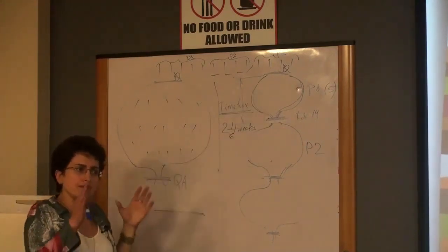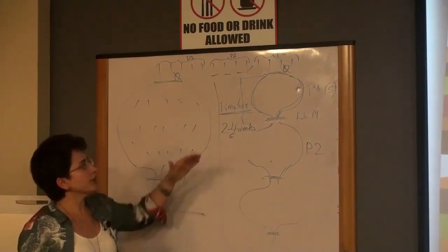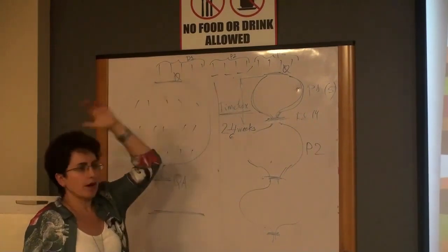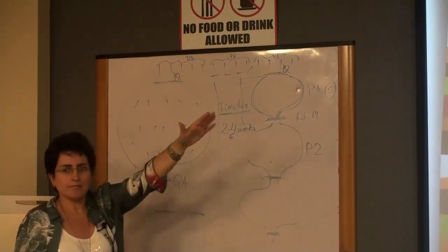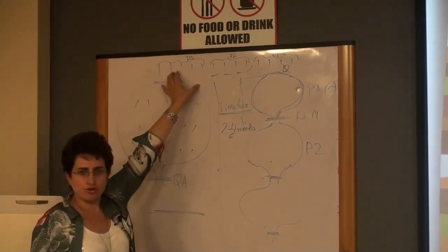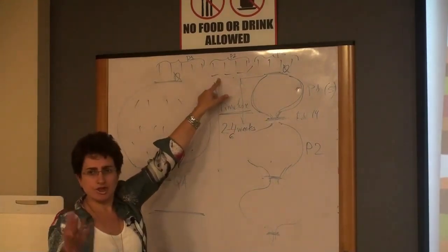So if you know that the market for your application is quickly changing, and you cannot reasonably predict and prioritize all the requirements 6 months ahead, at least prioritize for the next 4 to 6 weeks. See what you should implement, what you must implement in these 4 to 6 weeks, and then reprioritize and see if you need to change something.